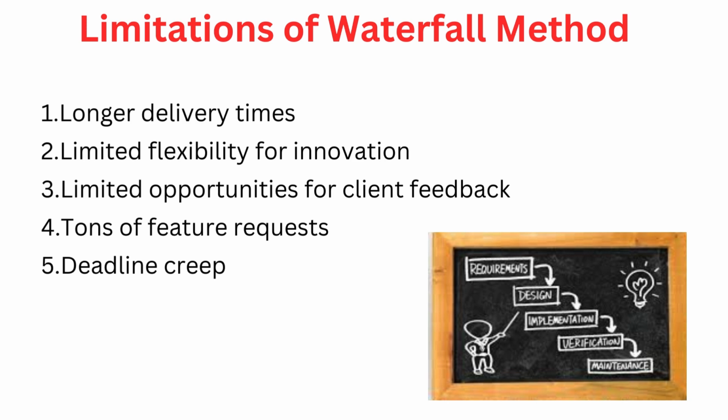So if at all there are changes to be incorporated into the system, then the deadline will be extended because the stages have to be revisited, taking a lot of time. For example, if a new change comes in during the design phase, though the change may be related to a specific part of the system, the entire design will come to a halt and requirements will be revisited, redocumented, reviewed, and signed off again by the customer. So all this will waste a lot of the time originally planned for the project. So it could delay the entire project delivery.